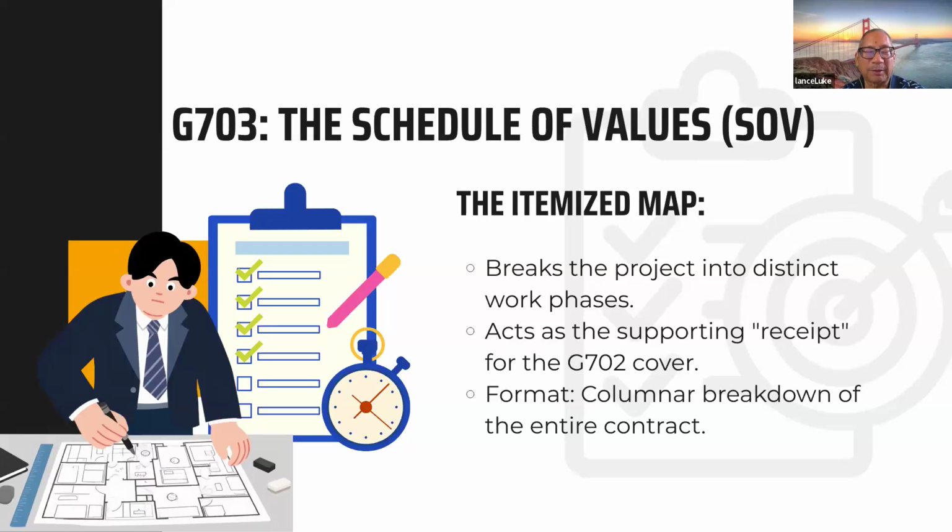And then the next month, the contractor would pour the concrete slab, and then he would bill the balance. So the first month, $10,000, and then the second month he would bill $40,000 because a concrete slab was poured and completed.